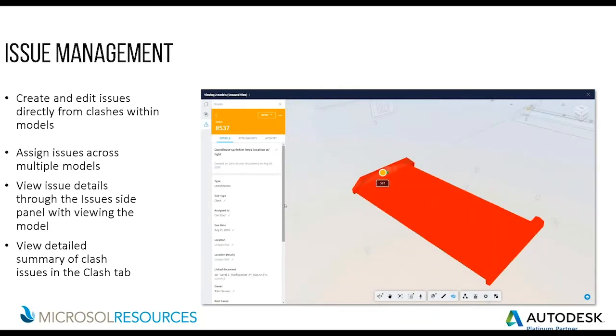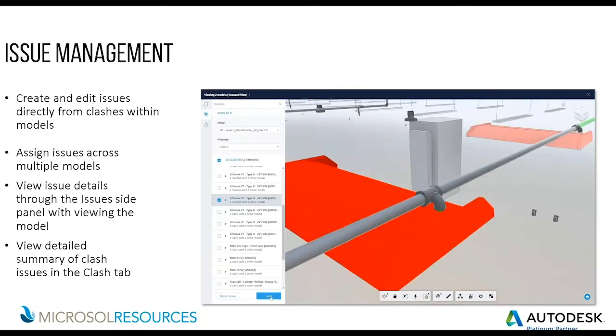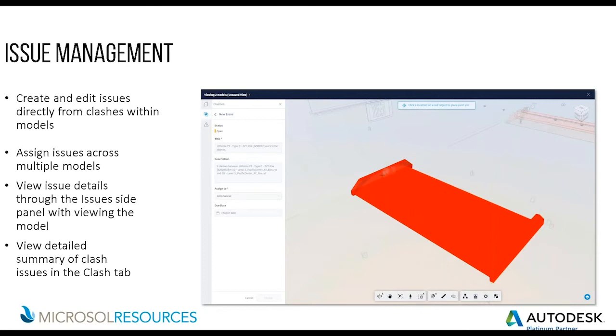The Assigned Clashes tab allows users to see a list of all the clashes with details such as element ID number, status, due date, company, and assignee, as well as a link back to the multi-model view with preserved clash highlighting. This new workflow gives users more transparency into the clashes that need immediate attention and keeps everyone on the design team accountable.